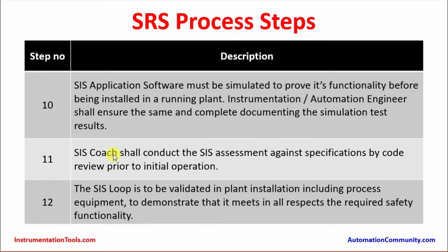Step number 11: the SIS coach shall conduct the SIS assessment against specification by code review prior to initial operations. There will be a safety instrumented system coach, or they can be named by a different designation in a different industry. They have to do the SIS assessment and review and approve the SRS before commissioning.